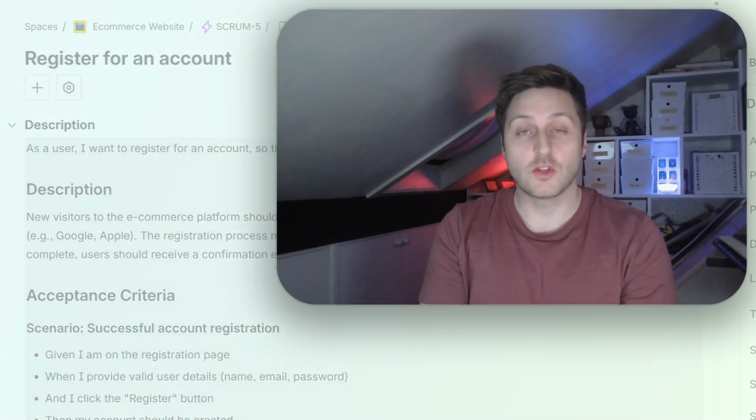their credentials. The reason that I put a description here is what makes a great user story, from my experience, is that you put some constraints around it. What is in scope for that user story effectively and what isn't? And the only way to do that is to be very clear in your description on what this means as a story. What should we consider before this story is done effectively?